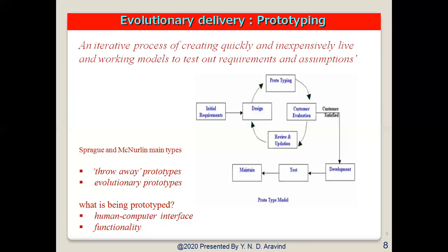So here software prototyping is becoming very popular as a software development model, because it enables us to understand the customer requirements at the early stages of the development. And it helps us get valuable feedback from the customers. So that helps us, the software designers and the developers, understand what exactly is expected from the product under development. So here the customer is going to give continuous feedback in the prototyping model. Based on this, we can make as many changes as needed.